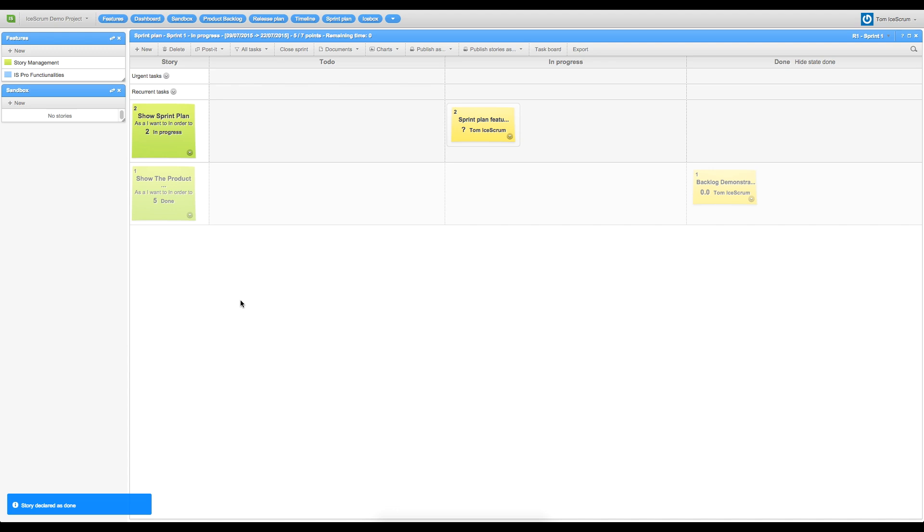However, I still want to show more sprint plan functionality, so I can shift my feature to the next sprint.